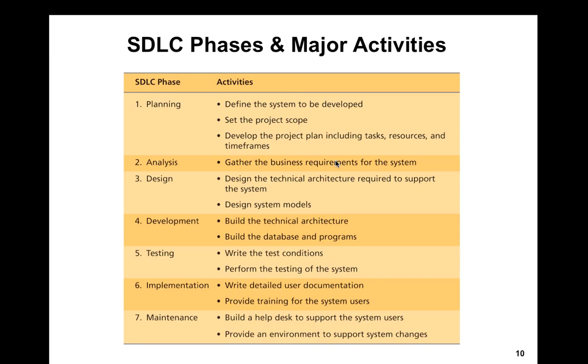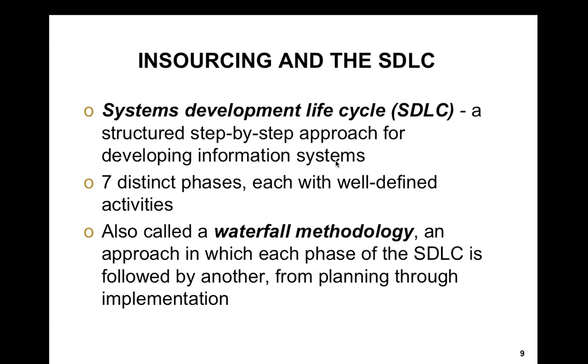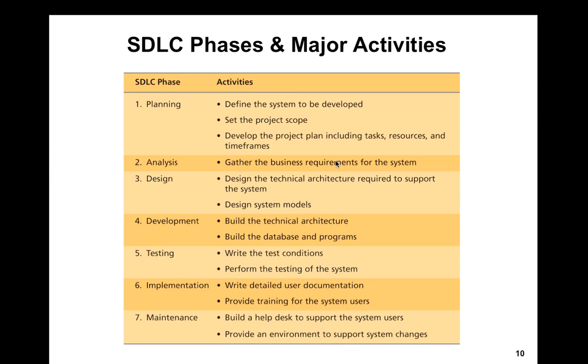All right. We'll see. Let me give you a little bit of background because there's obviously some interest, which is good. The development life cycle is kind of like project management, but it's not managing the project. It's managing the development of the software. And you break it out like a project plan. Those 7 steps are activities that need to be performed, but they're standardizing it, making it almost like a template for the development team to follow. So in step number 1, the planning stage, you're going to do your feasibility studies, your forecasting, your estimating, your costing, and stuff like that.